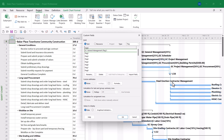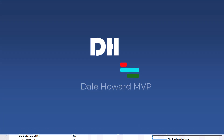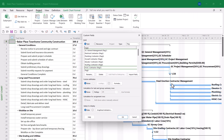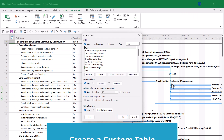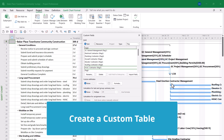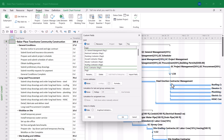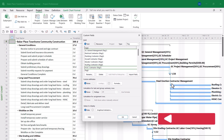From there, I'll need to create custom flag fields for each of the contractors as well — one for electrical, another for plumbing, another for drywall, and so forth. I took the liberty of creating each of these custom fields before continuing with the video. You can see that now I have flag fields for electrical contractor, plumbing contractor, and so forth. When finished, click the OK button.